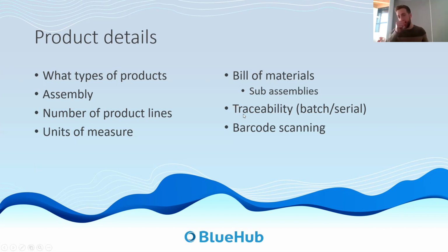With barcode scanning, this is something that gets a lot of excitement in the world of product sales businesses. And our advice always is that if you're not already barcode scanning, don't bring barcode scanning in initially with the new system. It's just frankly too much change for everyone to take on board. Nearly all the apps will allow barcode scanning, so it future-proofs it. But if they're not doing it currently, do not bring in barcode scanning in that first phase, and that's a key part of setting expectations around product data.